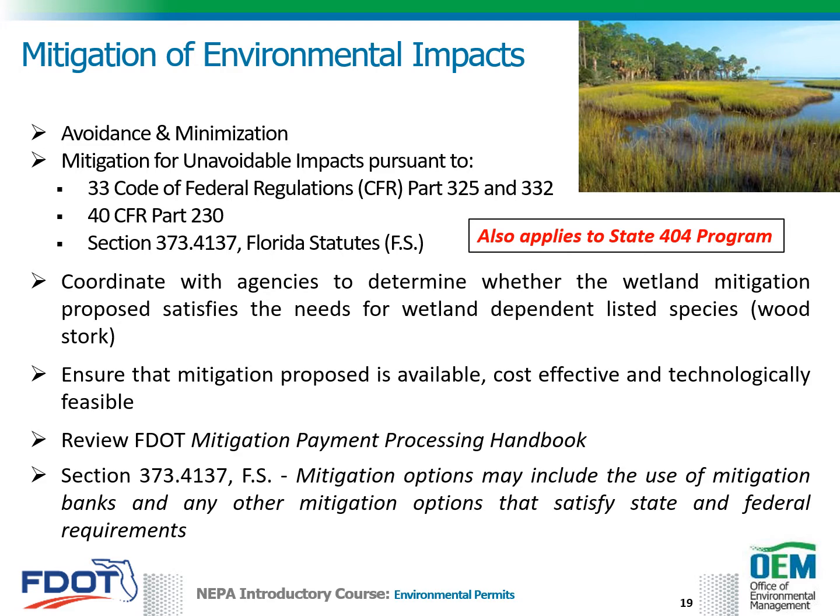Mitigation for unavoidable impacts is required pursuant to 33 Code of Federal Regulations, Part 325 and 332, 40 CFR, Part 230, and Section 373.4137 Florida Statutes. This applies to permits issued under the State 404 program as well.